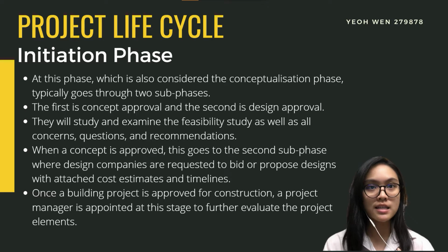Most project objectives are defined primarily as a business problem or opportunities. A business case or feasibility study is typically prepared at this stage, which will look at all the factors required during the build. This will help determine whether continuing with the project makes sense for the business. This phase, which is also considered the conceptualization phase, typically goes through 2 sub-phases. The first is concept approval and the second is design approval.